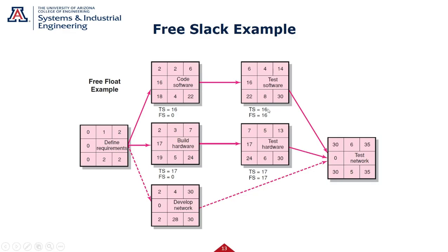What they mean by this is, let's take test software. It's free in the sense that if it moves anywhere in here, because I have 16 days, I don't care, because these people over here waiting for this won't be ready till day 30. And so I don't need to let them know. I kind of have free time in here.